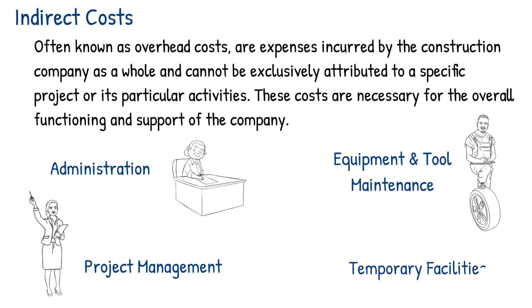Temporary facilities: rent, utilities and maintenance costs for on-site temporary offices, storage units and facilities required for project management and coordination.